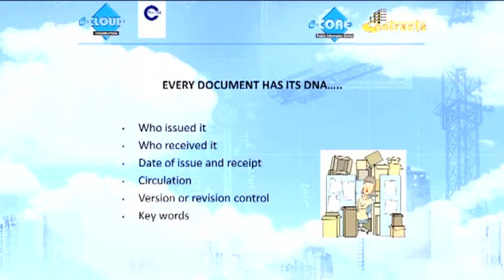Every document has a DNA. Who issued it, who received it, the date of issue, circulation, version or revision control, and then certain keywords on the document. And that's really the DNA of the document.